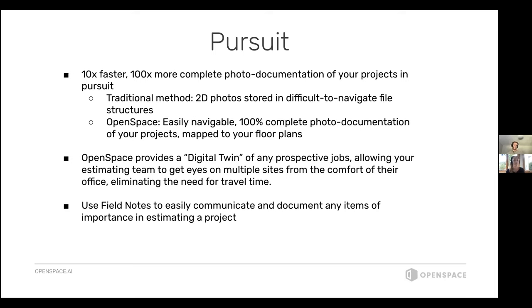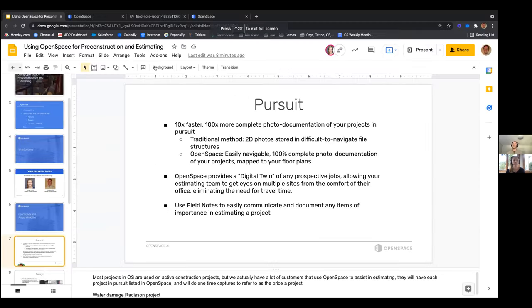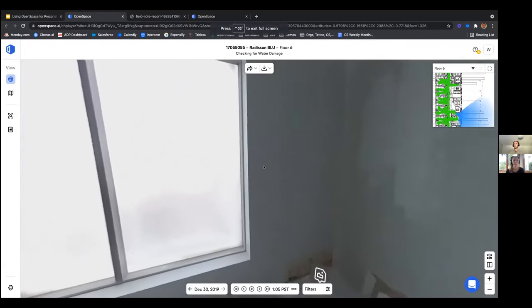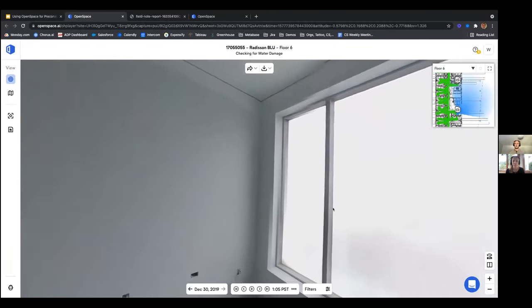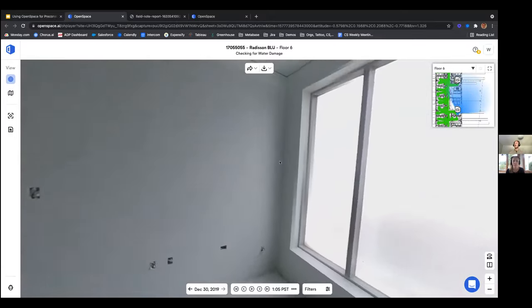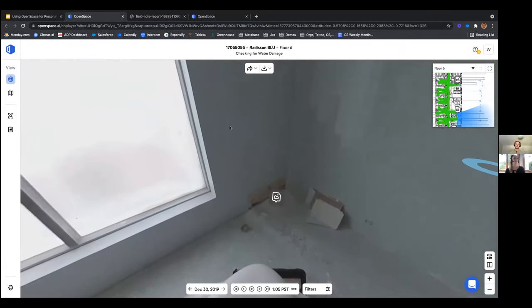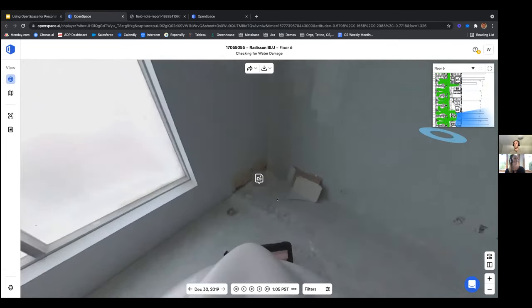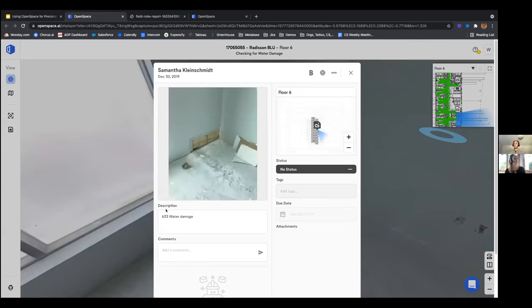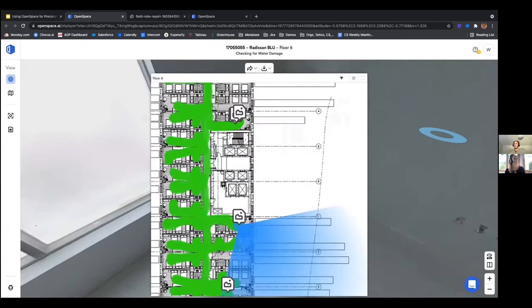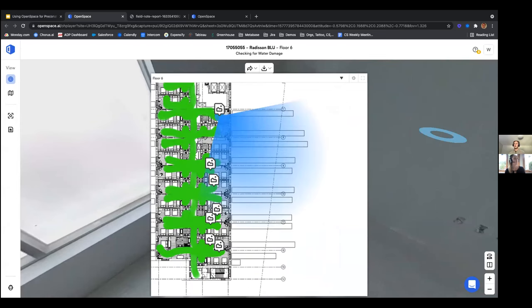Issues can be easily tracked and documented using our field note feature. For example, let's say you're pursuing this apartment complex project — a contractor had a great use case where they documented areas with water damage so they could include it in their estimates. Anywhere they saw water damage, they'd snap a quick picture, create a field note, note the room, and mark that water damage needed to be remediated.